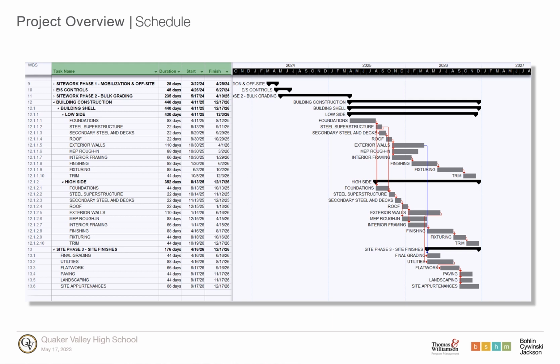The foundation work will commence upon establishment of the building footprint. The construction of the building will also occur from the low to the high. Accordingly, the area that I have labeled low side, the gymnasium and auditorium wings, will start first. And at the point at which the lower foundations are complete, the high side will commence. From there, the overall building sequences will continue to follow this low then high pattern.